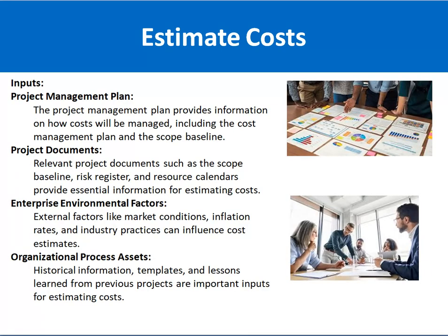Now, the inputs required for estimate cost. The first one is the project management plan. Friends, the project management plan has different subsidiary plans, including the scope management plan and the cost management plan. Especially the cost management plan and the scope management plan help you to estimate the cost.